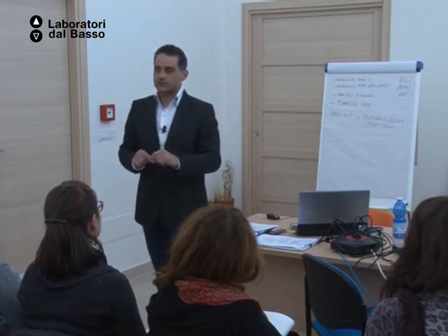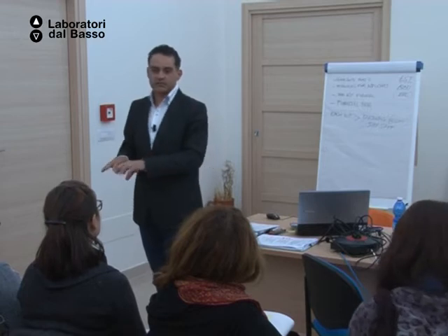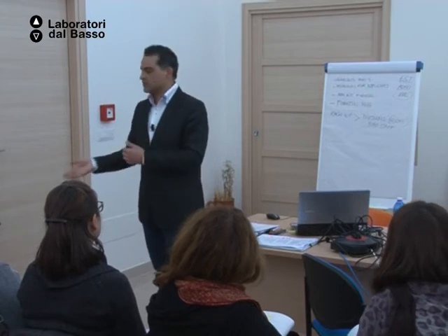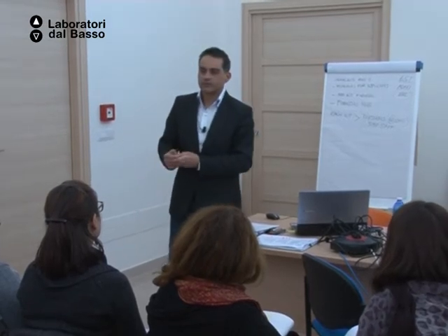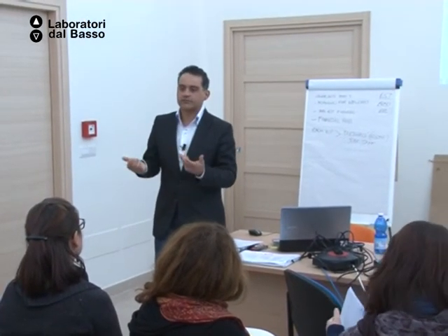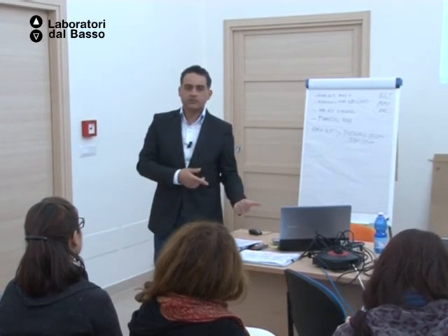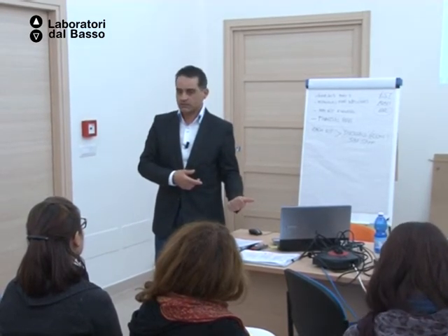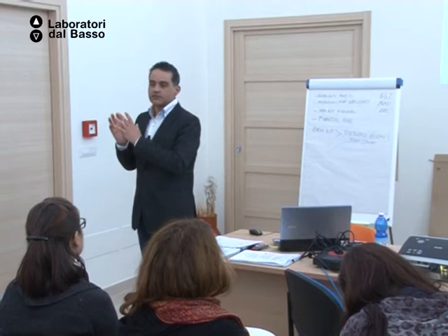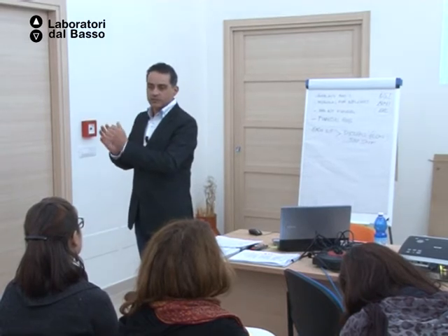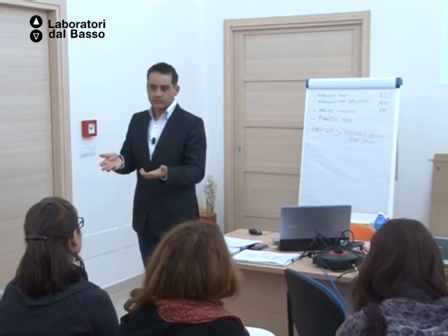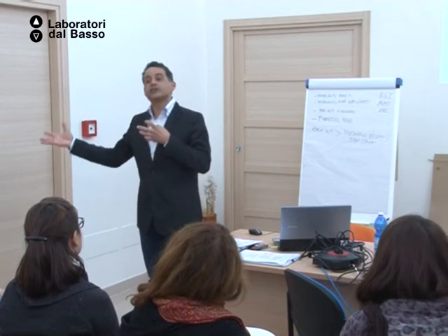When you build your project, 90% of the time, and you start building your project with the European, you will see that there are differences between what you, that's what this lady was saying. The manager that she worked with has a cost of 440 euros, which is much more than the 247 euros of Italian sailing cost. So at some point, your project on some aspect will not match what Europe is ready to offer you, to give you, to co-finance.